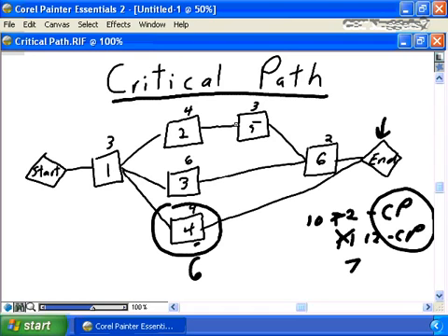To understand which tasks are on the near critical path, your project management software will also do a calculation for you, which will determine a value called slack. The closer the slack value for each task is to 0, because tasks on the critical path will have a slack of 0, the closer they are to the critical path. In this original instance, task 3 would have a slack of only 1, meaning it's on the near critical path, and the farther the slack is, in this case the slack would be 5, the difference from 7 to 12, identifies that they are not near the critical path and therefore need to be managed appropriately.